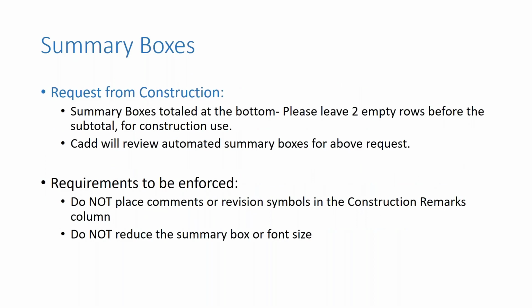We have had a request from our construction office for summary boxes that are totaled at the bottom to please leave 2 empty rows before the subtotal. This allows our construction office to put any notes in there. And the CAD office will review the automated summary boxes to incorporate this request.